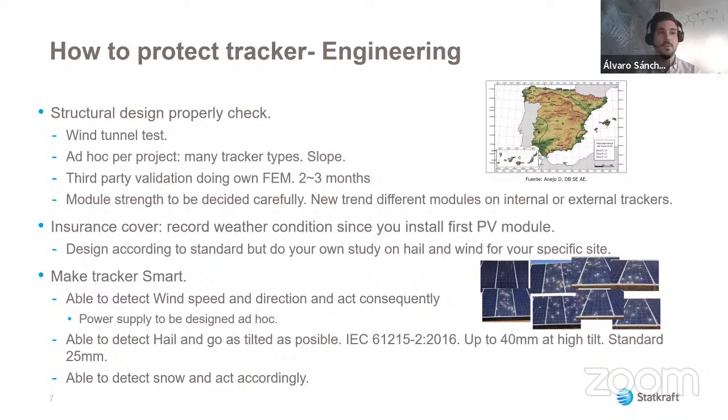We have implemented in our technical specifications that when you install the first module, you need to have recorded all weather conditions, basically the wind speed, wind direction, and also snow. Because if you have any issue, you need something to prove that the insurance has to cover you, because otherwise they can say it's a misinstallation, or any other issue. They are going to try to cover themselves.